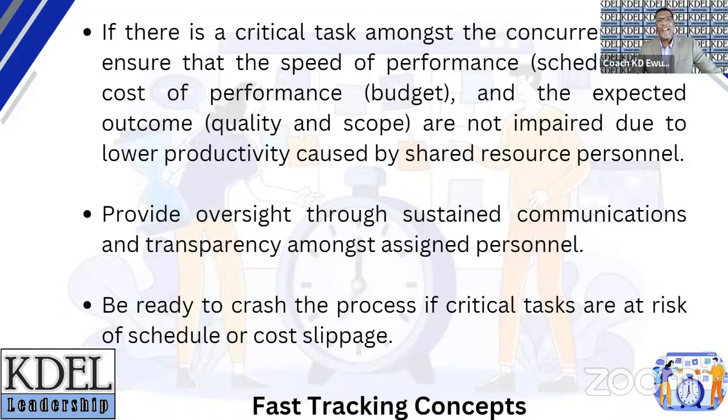We should then identify idle resource persons in other task assignments that have some slack, and then reassign them to the urgent task for at most the duration of the slack available. We should be careful not to take resource personnel away from their original tasks for longer than the available slacks in their initial task assignments. For example, activity D has a slack of 3 weeks. So we must not reassign its resource personnel for more than 3 weeks.